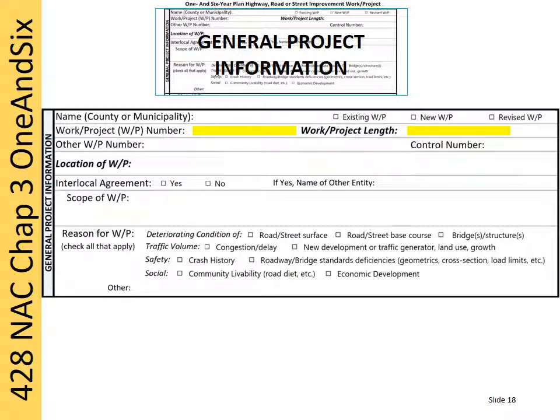Once a project number has been used, it must not be used for another project, even if the original project is indefinitely postponed, unless no money has been expended on that project. See Proposed Instructions, section 9 on page 30.